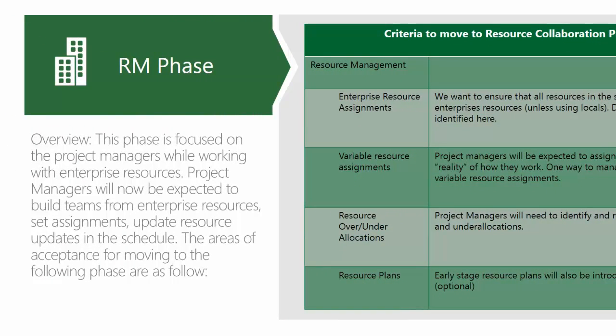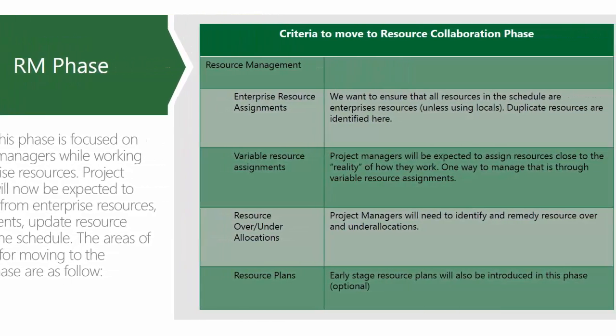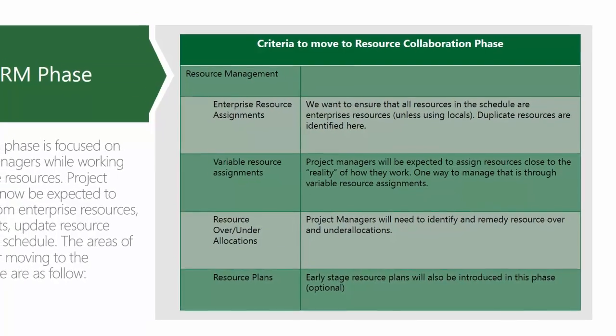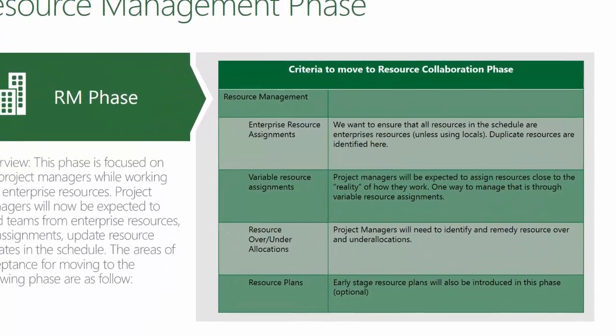In the resource management phase, we want to start analyzing and reviewing resources. We're allowing project managers to start building teams, bringing resources into the tool and making sure they're assigning properly. We look for areas of variable resource assignments, whether they're resource loading properly, and we're looking for over and under allocations — essentially assigning resources to projects and analyzing them properly.